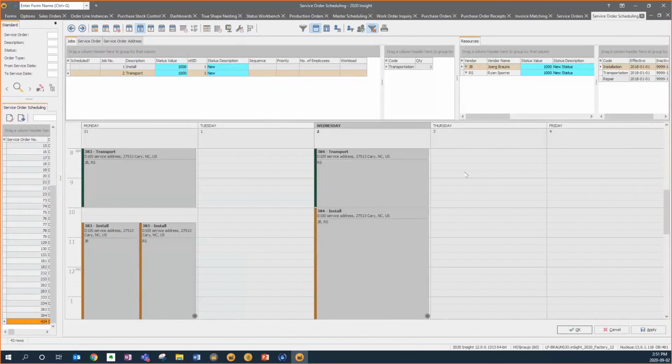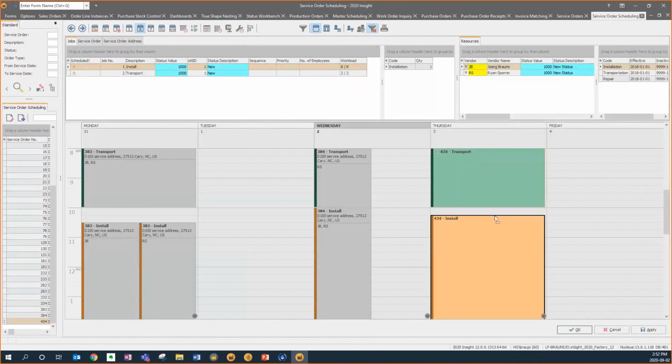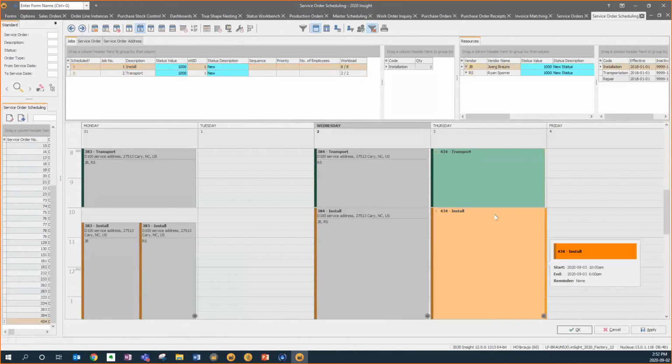and maybe for Thursday, I would say somebody needs to go there, and somebody after that needs to do the installation. And I can have all my installer teams or service guys over here, where I would say, well, Ryan needs to go there, and then Ryan and York have to do the installation together. So that means when I look at my resources later on, two people are really occupied for that time. And I have different kinds of views for the whole scenario.